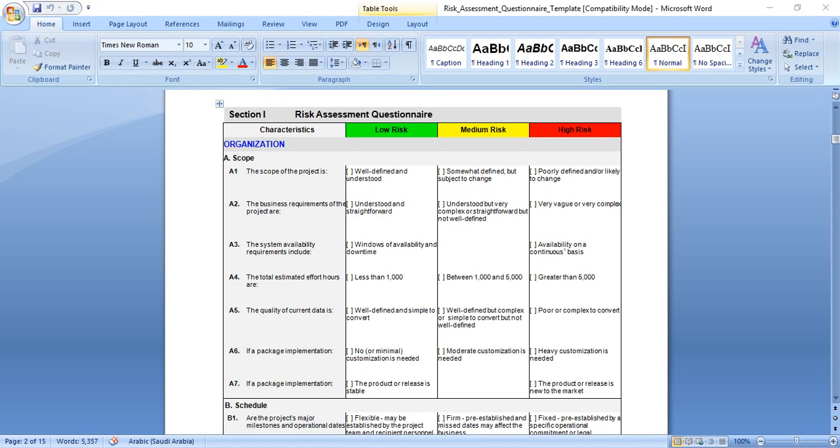The scope of the project is well defined and understood, this means low risk. Somewhat defined but subject to change, this means medium risk. Poorly defined and or likely to change, this means we have high risk.